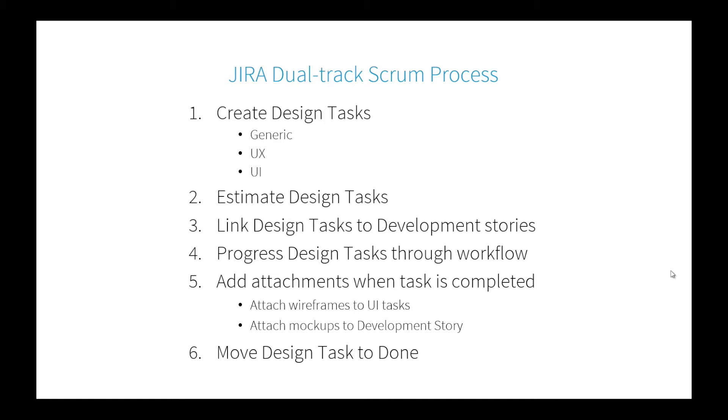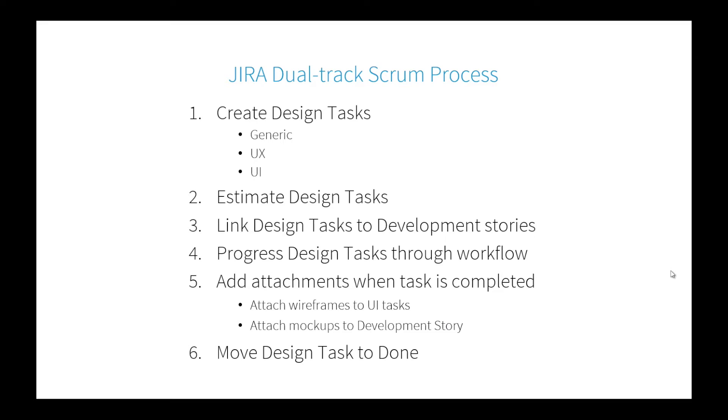Progress it through the workflow just like a normal story and then add the attachments to the relevant story when we're done. If you're doing a UX task with wireframes, you'll add those to the UI story that's dependent on those wireframes. If you produce mockups, you'll add them to the development story. When developers roll up, they have those designs ready to go. You're essentially doing the same thing the development team is doing, except you have tasks focused on stories in the next sprint.